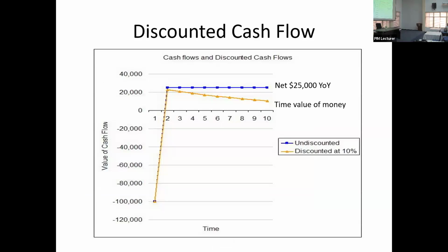The cash flow or discounted cash flow, why it gives you the wrong answer is if you don't take the discounted factor, as you know, it will say you are always going to get the same value, the return. But if you discount it, at some point it will cross the zero. So when you put up a board paper, you are misleading the board. Because at some point this project is going to hit zero.